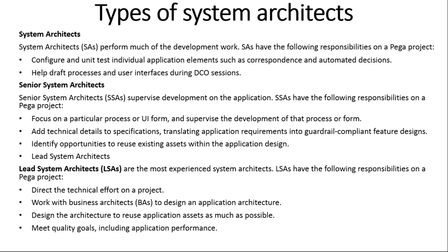If there are 3 developers, the product backlog may have 100 user stories, but within the 2 weeks, how many stories can I complete? Only that many user stories will I take, and then I will start the development.